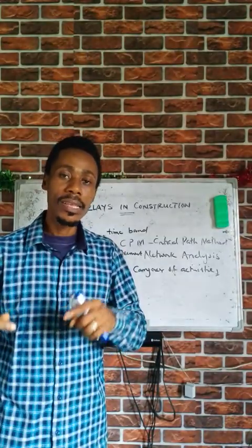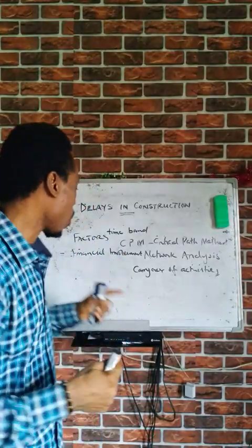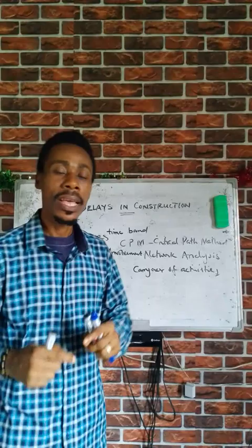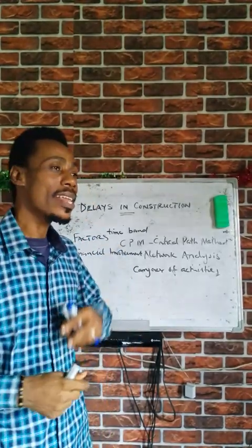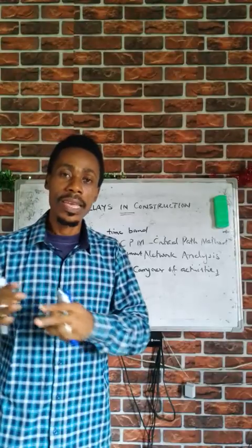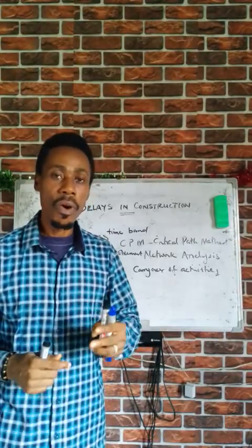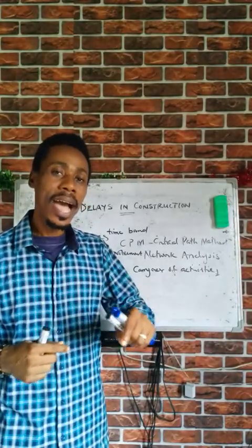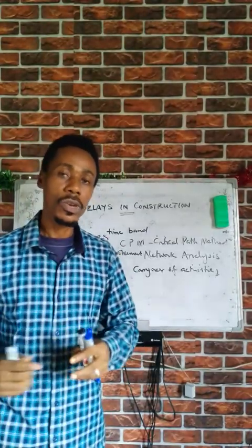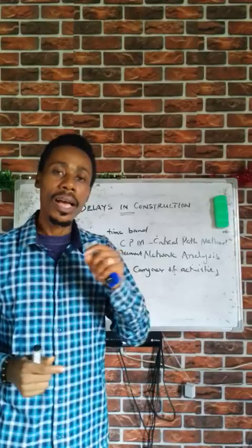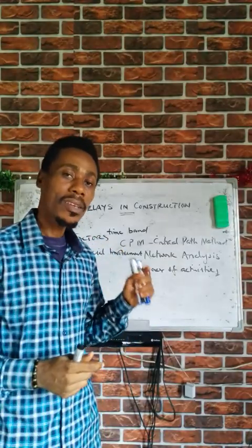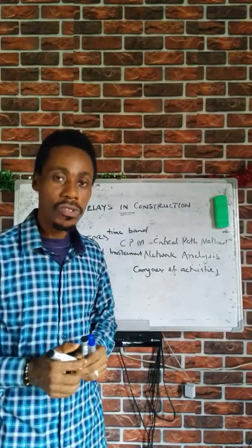It is the place of the client to provide every financial backing that the project requires. So in a case where there are lapses in the release of funds, it can hinder the sequential flow of that construction work. So financial involvement is one of those factors that cause delay in our construction work.